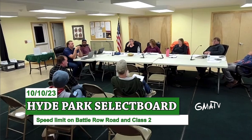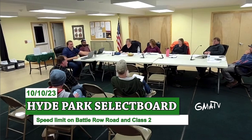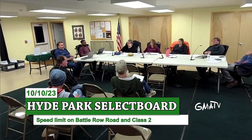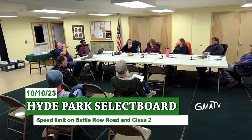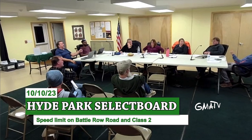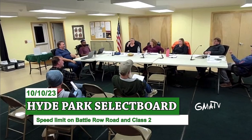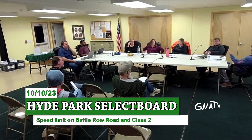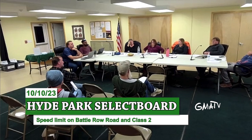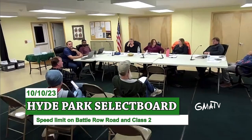So there's a list, you know, maybe. If I had to guess, it's probably under $5,000 for all the signs. Well, I just did, there's 11 roads. Well, now we've got 12, and I said 3 signs a road, and that's not going to be the case. Triple that, yes. Like more roads are a mile long. But quadruple that. Right. It could be just one at the beginning, because it's only 2,000 feet each side. Right, that's what I'm saying. Your speed limits are going to be that, and you need reduced speed at each one of them. So you're going to quadruple that. Call it 12 signs per road. Well, no, not the ones that are half a mile long.